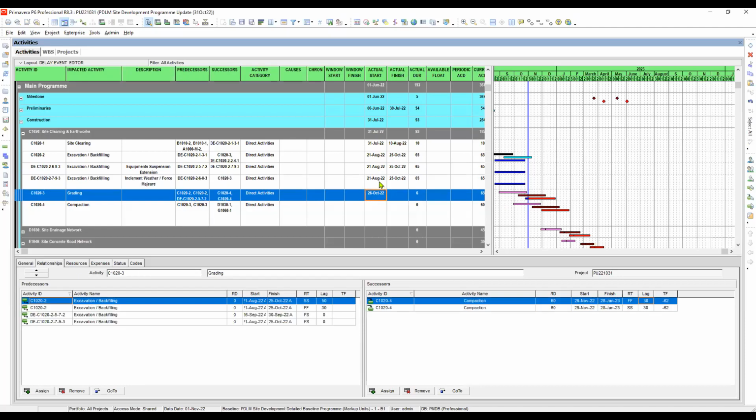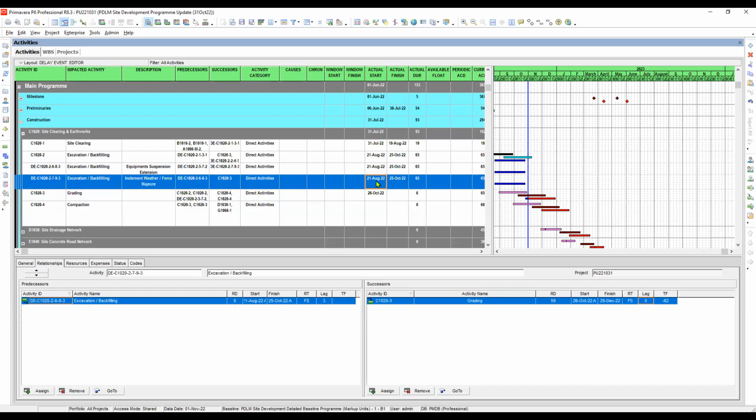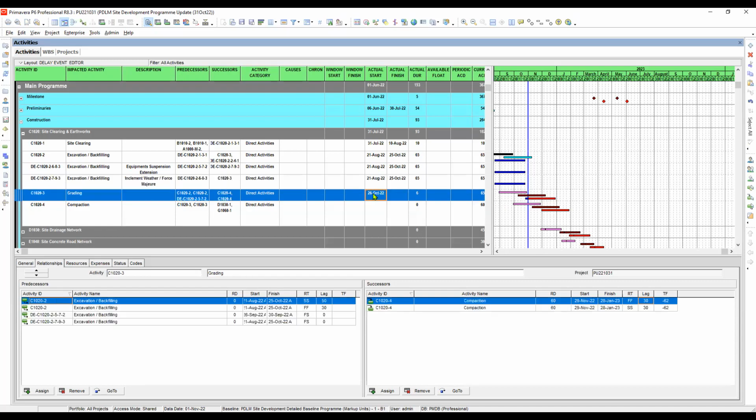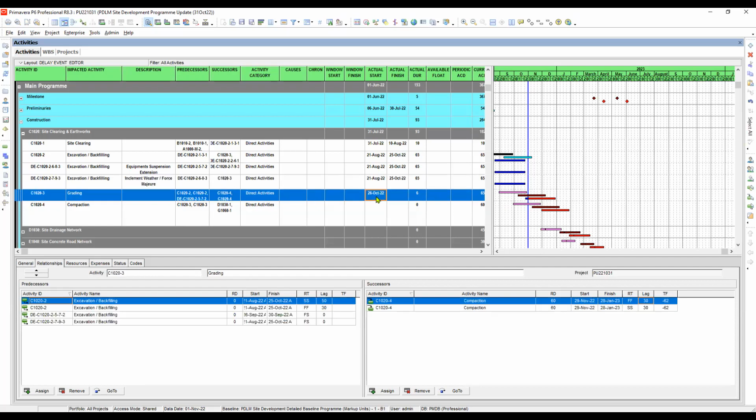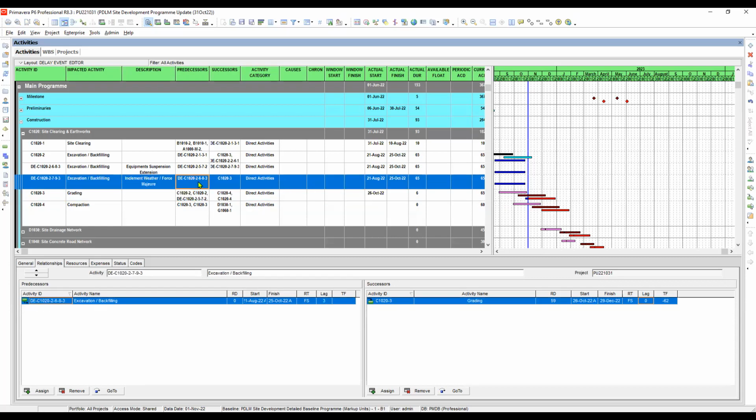So that means from the 20th of October down to the 26th of October, the 20th of October was the period of the force majeure or inclement weather. After that, the work started by the 26th of October. So that means there was a lag of 5 days.